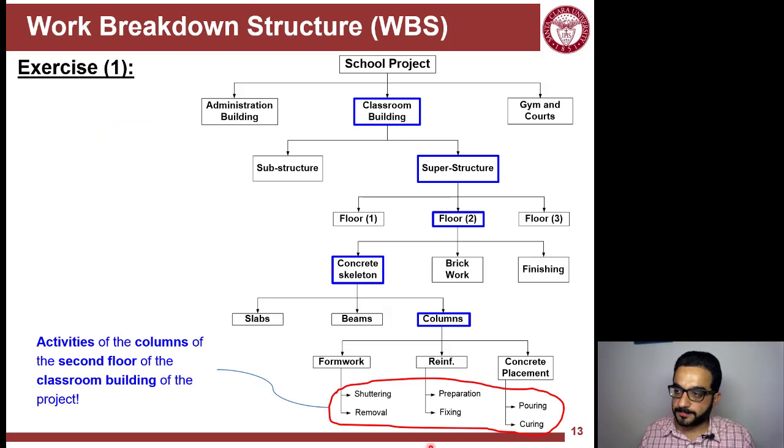So here, these are the activities now, like shuttering, meaning installing the formwork and then removing the formwork, preparing the formwork and fixing it or installing it, pouring the concrete and then curing it. Curing can be an activity instead of just wasting time until the concrete cures, if you're actually putting in effort to cure the concrete, like spraying water or putting cover sheets on the concrete. So if it requires resources, then it's a task. If it's just a wait of time, we'll see how we can deal with it in the schedules using